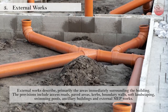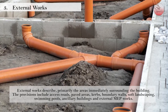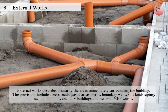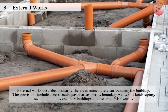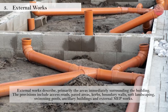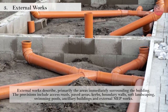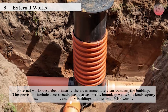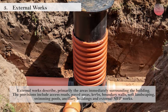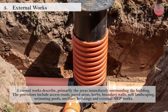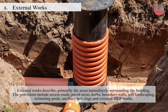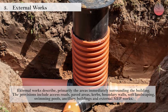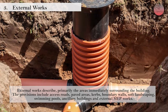External works describe primarily the areas immediately surrounding the building. The provisions include access roads, paved areas, curbs, boundary walls, soft landscaping, swimming pools, ancillary buildings, and external MEP works.